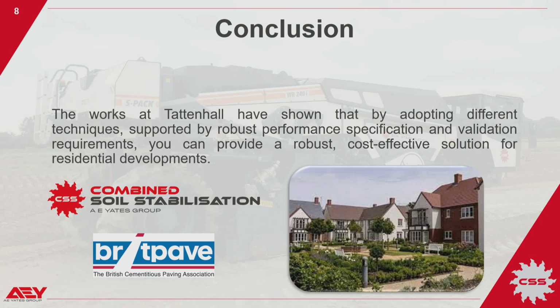CSL undertook the first option and increased the strength of the compaction regime, which also had the effect of eliminating the piling requirements with a likely saving of hundreds of thousands of pounds for the scheme. The success of the soil stabilisation approach is underlined by the project being underwritten by a warranty provider with the vision to understand and forward the use of soil stabilisation for residential developments.